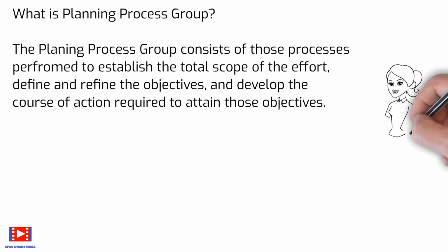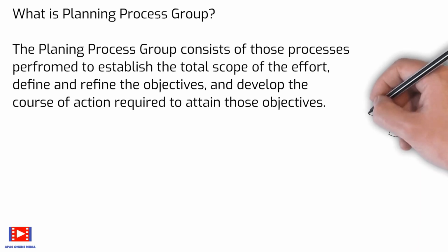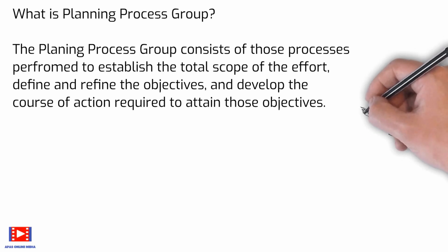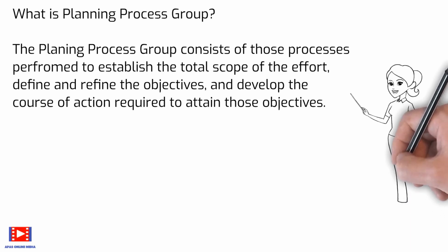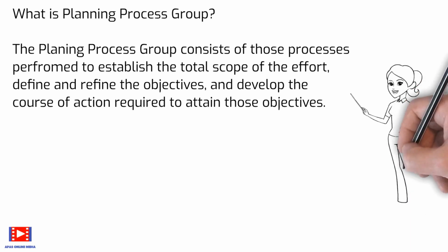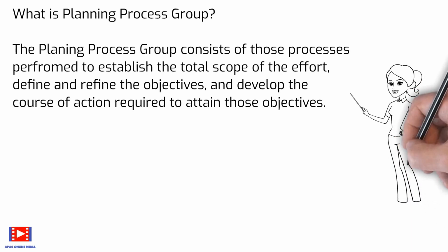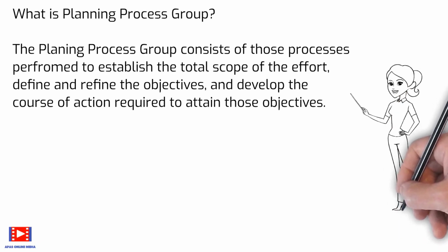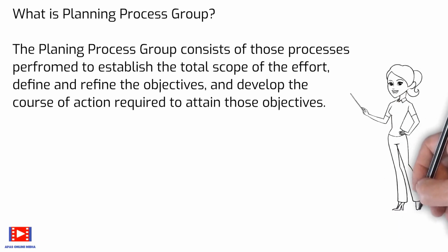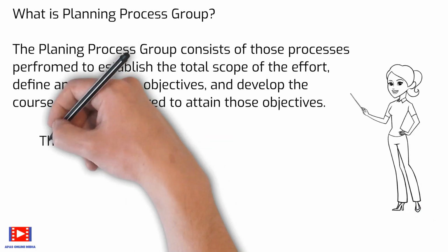Significant changes occurring throughout the project life cycle trigger a need to revisit one or more of the planning processes and possibly some of the initiating processes. This progressive detailing of the project management plan is called progressive elaboration, indicating that planning and documentation are iterative and ongoing activities.